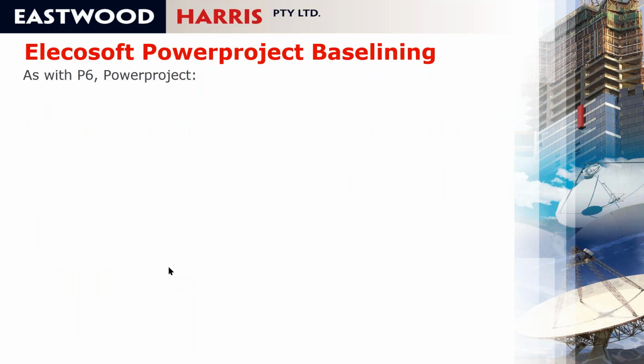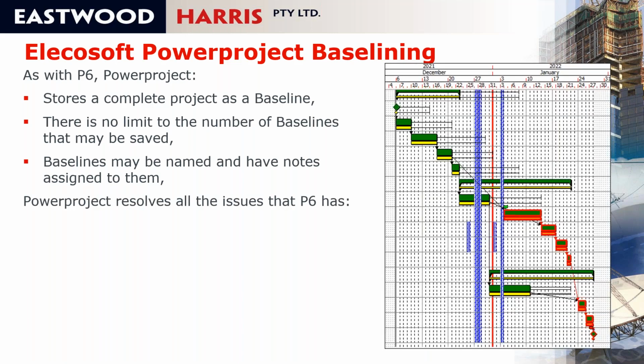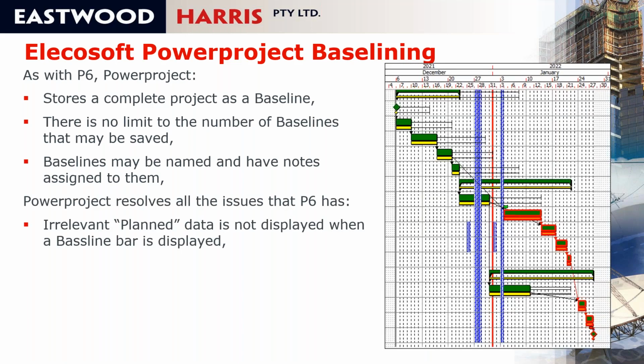Elecosoft Powerproject baselining. As with P6, it stores a complete project as a baseline. There's no limit to the number of baselines that may be saved. Baselines may be named and have notes assigned to them, which again you can do with P6, but not with Microsoft Project. And it resolves the issues. So, for example, irrelevant planned data is not displayed when you display a baseline. So if you display a baseline in P6, it will display the planned dates as a baseline unless you actually